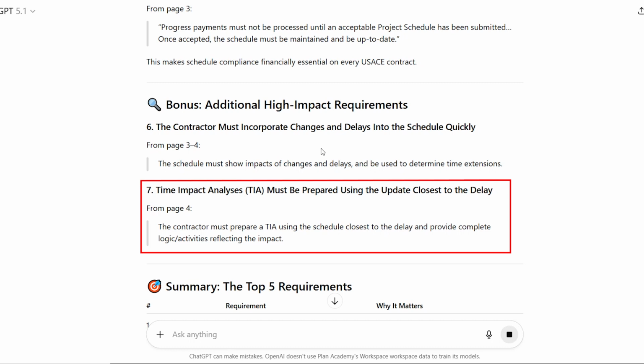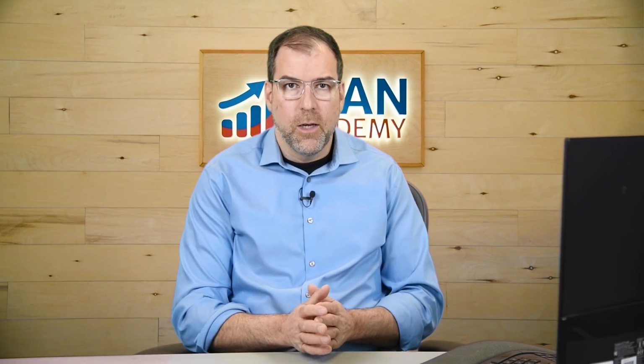So getting specific about time. You will also see information in here around total float. We don't want giant total float values on schedules. It could hint that some of the activity linking was not done well. We also might not want long duration activities, so a 15-day maximum duration is common, and other things like that. Activity coding, how schedules should be submitted, those timelines, all of this goes into a schedule specification.